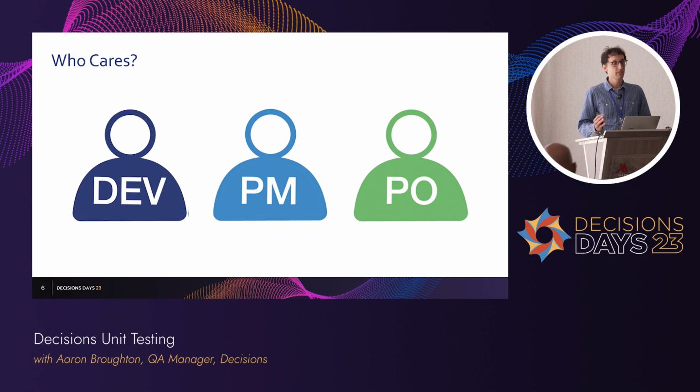When you're asked for estimates, developer, on how long something is going to take, you're going to be inclined to think, all right, well, I can build this thing. I got to build a form. I got to build some rules. Okay, a week. And you haven't accounted for any of the testing that needs to go into that. Put that in your mindset. When you're giving estimates, put it all together, because it's not done until it is tested.